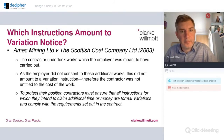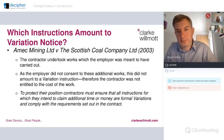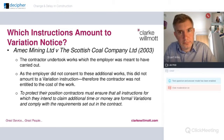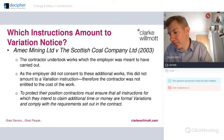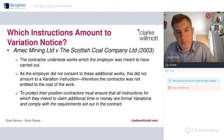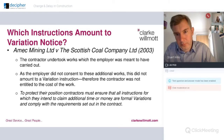AMEC and Scottish Coal Company is a Scottish case. The important point is that in order to protect your position, you have to ensure all instructions are formal variations and comply with the requirements set out in the contract. In that case, the employer didn't actually express consent to the work done, and even though the contractor had done the work, it wasn't considered to constitute a variation entitling the contractor to additional time and money. So please do not be averse to sending notices thinking it will all come out in the washing. Check your contract, understand your position, put the requisite notice in.